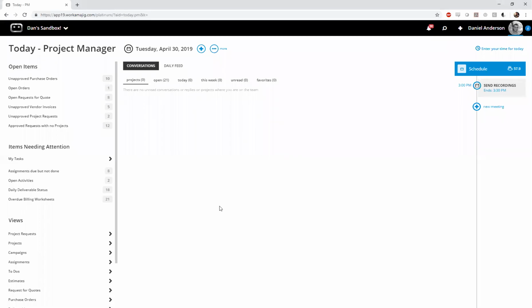We'd say we have a due date for your project, and we're checking the planned start and complete date of every task in that project to make sure it's not finishing after that due date. So that's one side of it. As a project manager, that would be your notice that there's something potentially awry.